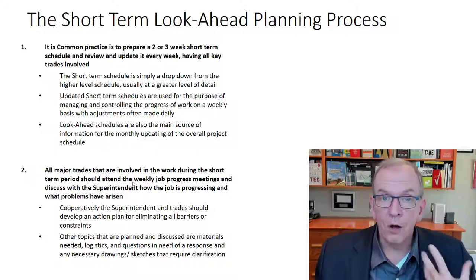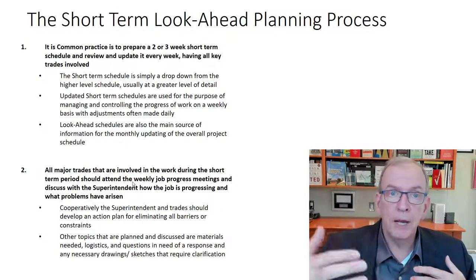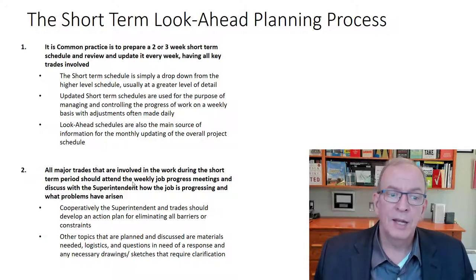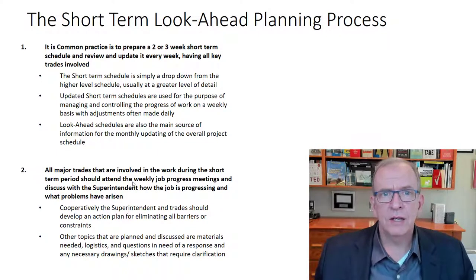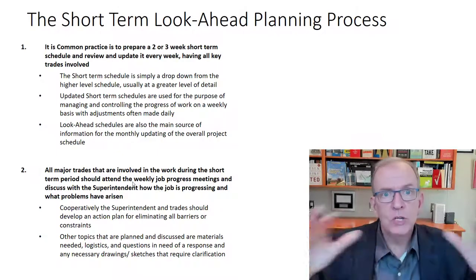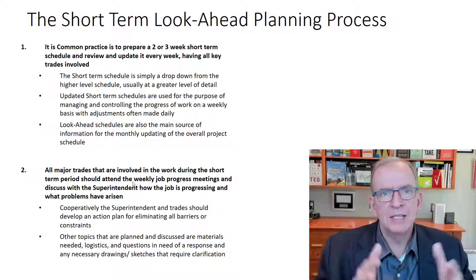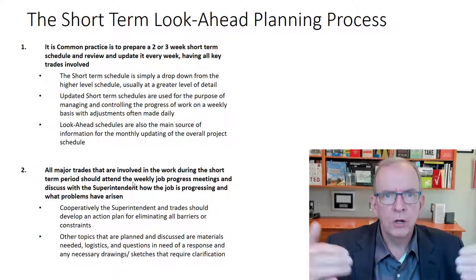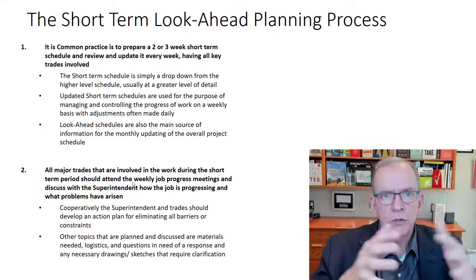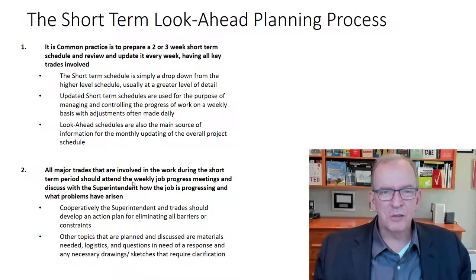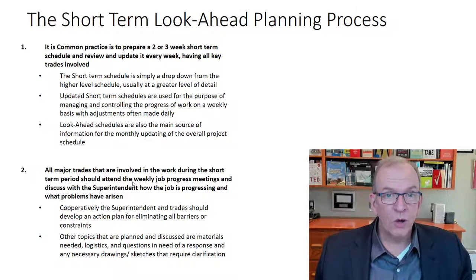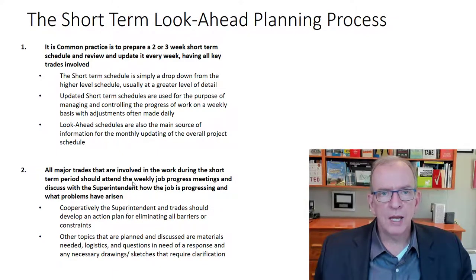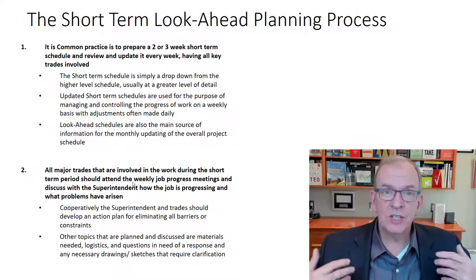All the major trades involved in the work coming up are part of these weekly meetings, because if there's a problem, you want to know about it there. Traditionally, it can be done somewhat autocratically by some site superintendents — there's pressure coming down from the original baseline schedule with specific dates allocated. When contracts were signed, trades agreed to reasonably try to fulfill those dates. But when they really want the work, they're more likely to say yes to things, and even in two-week look-aheads, if there's a lot of pressure, very often they'll say they can do it but don't really think they can — and that's just setting yourself up for failure.